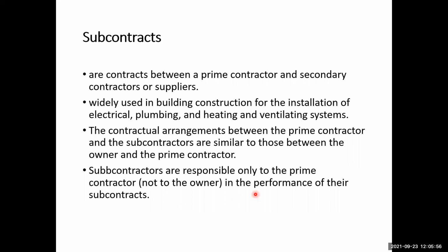It is the main contractor or the prime contractor who will report their work or their subcontractors' works to the owner. It is obvious because the contract is between the prime contractor and the subcontractor, not between the subcontractor and the owner.